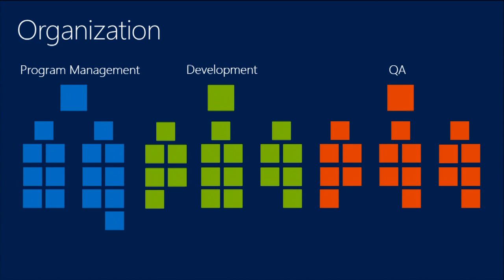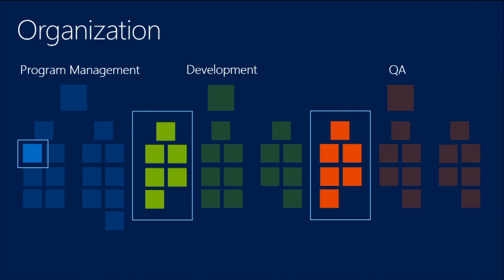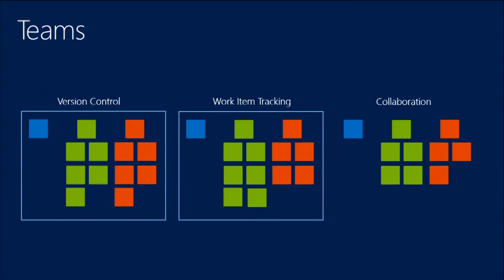Now, this is what the organizational structure looks like. Our teams, however, are matrix teams that cut across them. We build these things called feature teams, which are made up of 1 or 2 PMs, some QA, and some dev people. These teams are pulled together and called feature teams. My feature team is called the WIT Experience Team, the Work Item Tracking Experience Team, and our responsibility is all the Agile tools that you've been seeing. So we have some consistency. Here you see some of the teams, pulled together around a feature set. They're pretty consistent, and they stay together for about a year or 2.